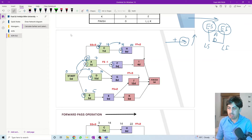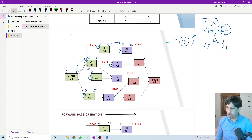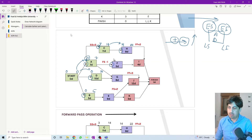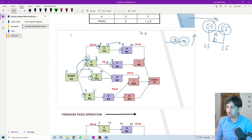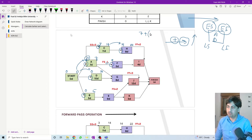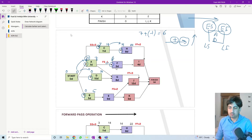For activity F, we have only one option coming from here. Moving forward we use addition, but this is a finish-to-start relationship with a lag of minus one. So it will be seven plus minus one — seven minus one equals six. Six plus five equals eleven.